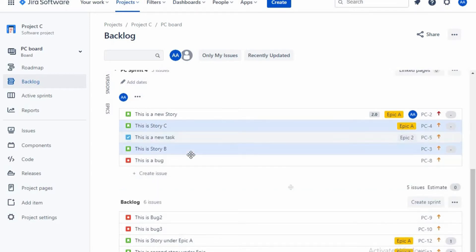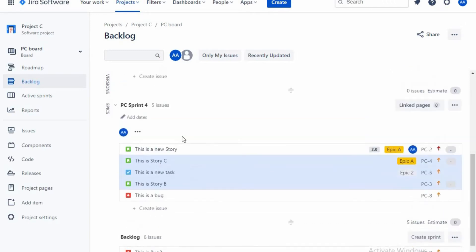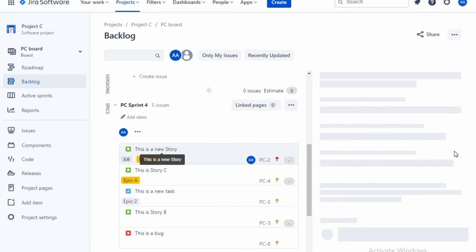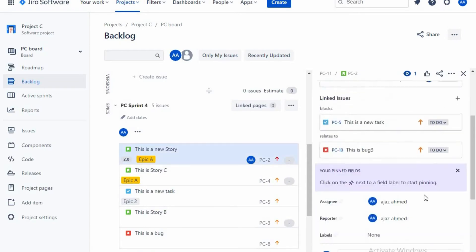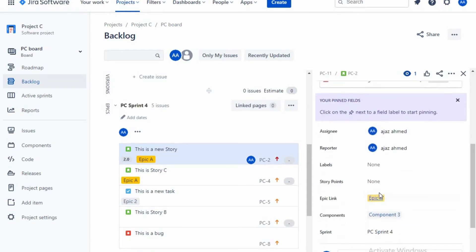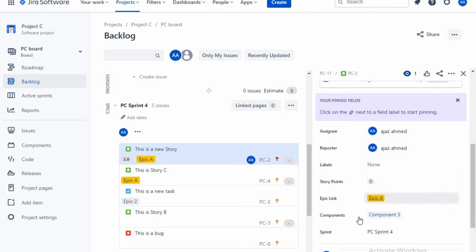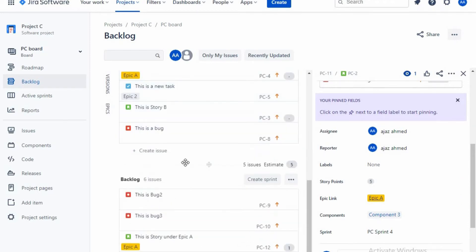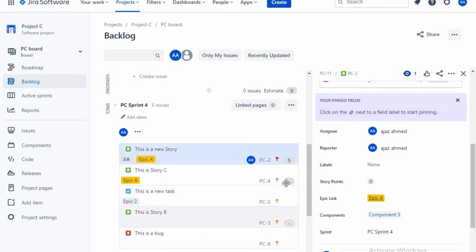So now you have five issues in this particular sprint. As you have pushed into the sprint, you could see whether this story is having assignment and if it is not assigned, you could have given assignee name. Already it is assigned. You can also estimate how much it is, like five story points. Already explained about estimation. So now all the stories, whatever bugs we are going to fix in a particular sprint, we are keeping it in a sprint.